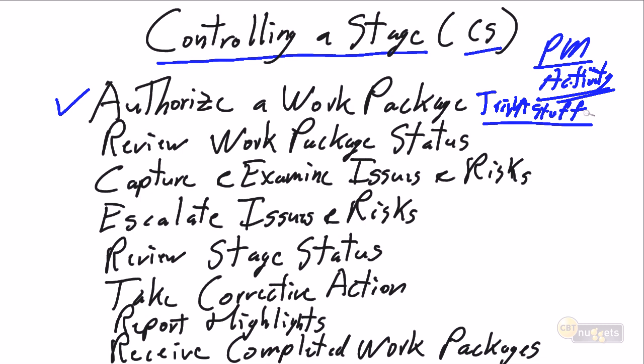We formally assign the team members to each work package. We review their understanding of the work package. We validate the estimate to get the work done. And then we obtain their commitment to deliver the work package, the deliverables from that work package for the project within that expectation. We work with the team on a regular basis, I would suggest weekly, to review the work package status, where we track actuals and the ETCs, the estimates to complete, and validate that the work is going well.